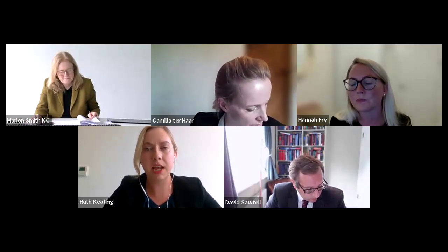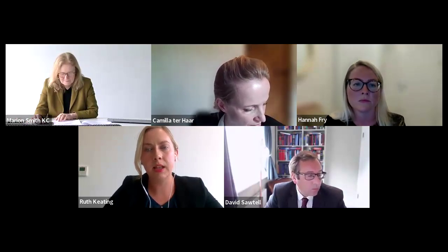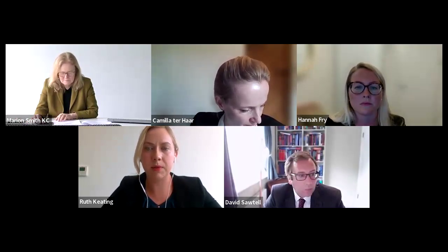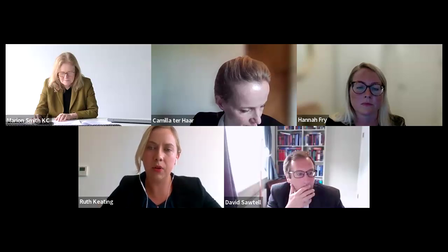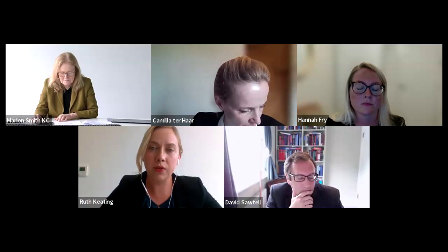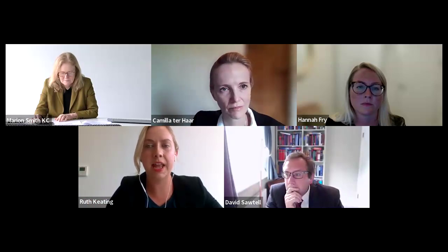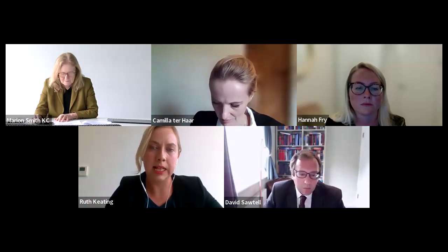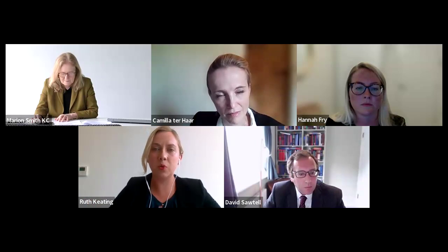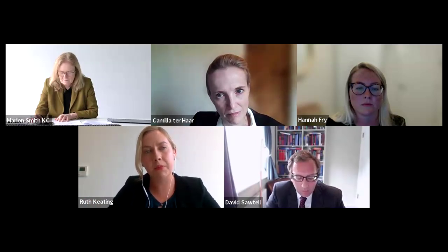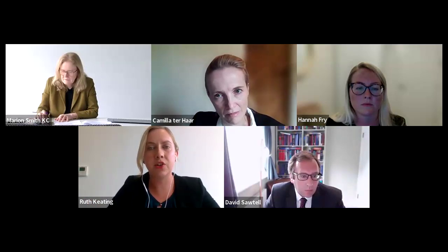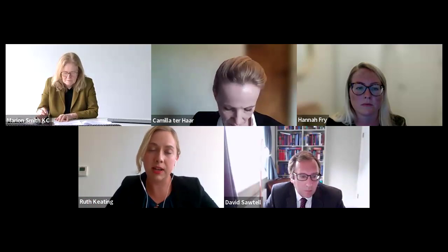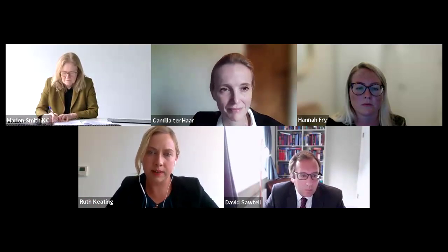And it says, to the extent permitted by the statutory requirements, the contractor shall have no greater duty, obligation, or liability than to exercise reasonable skill and care as provided for in the above clause in respect of such design, and under no circumstances shall the contractor be subject to any duty, obligation, or liability which requires that any such design shall be fit for purpose. So pretty clear wording there, but I think it's worth flagging that it is caveated by that important update at the start of the subclause, that to the extent permitted by statutory requirements. So first off, it's not a complete release for contractors. I think that's important to say.